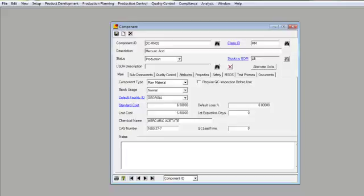And then a second lead time to be added to the first that represents quality control's lead time. Once the raw material gets here, how long do we normally expect before that raw material can actually be used in production?